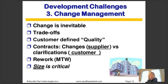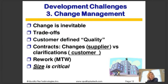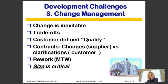Changes that happen are typically something the supplier wants to resist, while customers call them clarifications rather than actual changes. There's also traditional rework: we have 20 to 40 percent on a project that is typically rework. If it's 40 percent rework, Monday through Wednesday we do great work, then Thursday and Friday we redo that — that's rework. The size of rework and the size of changes is absolutely critical.